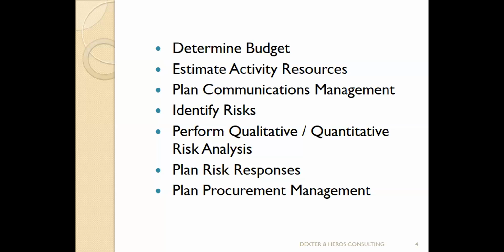So my sister here, what's the name, ma? Vanessa is a stakeholder. I have like 25 stakeholders in the project. Vanessa is one of them. Planning communication means I'll find out what kind of information Vanessa will want me to always make available for her. Maybe I also want to find out the frequency she wants that information. She may say, Amadi, look, I need just a weekly summary of this area of the project. So she wants me to report on a weekly basis to her. Or she may say, Amadi, don't bother your head, just give me a monthly breakdown, I'm fine. Every month, give me a breakdown on how things went. So she wants me to do that on a monthly basis.